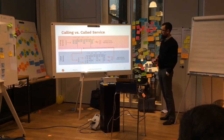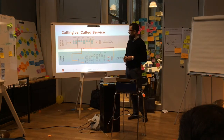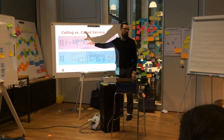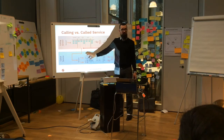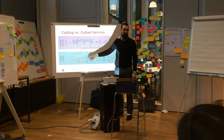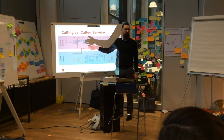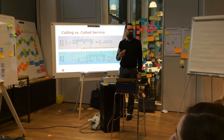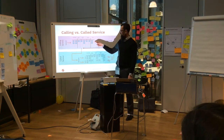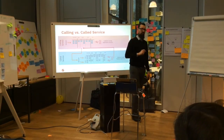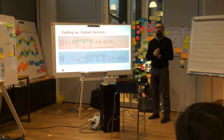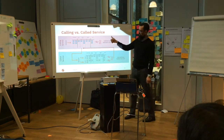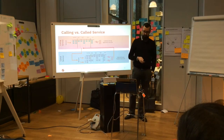Another thing we need is the definition of calling and called service. Imagine you're in product development and need some legal advice - you would be the calling service and you call your legal advisor. At Lotto24, before they launch something new, they need legal advice and approval. So you have a dependency - before you finish that work and launch it, you call the legal department and say 'we need this legal review, please prepare it upfront.' The calling and called service are two important things in a Kanban system.